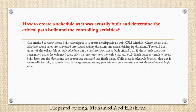One method to show the as-built critical path is to create a collapsible as-built CPM schedule where the as-built schedule actual dates are converted into actual activity durations and actual driving lag durations. The total float values of the collapsible as-built schedule can be used to show the as-built critical path if the as-built logic was determined using enhanced logic rules that not only use the early start and early finish dates to simulate the as-built dates but also determine the proper late start and late finish dates. While technically feasible, currently there is no agreement among practitioners on a common set of these enhanced logic rules.